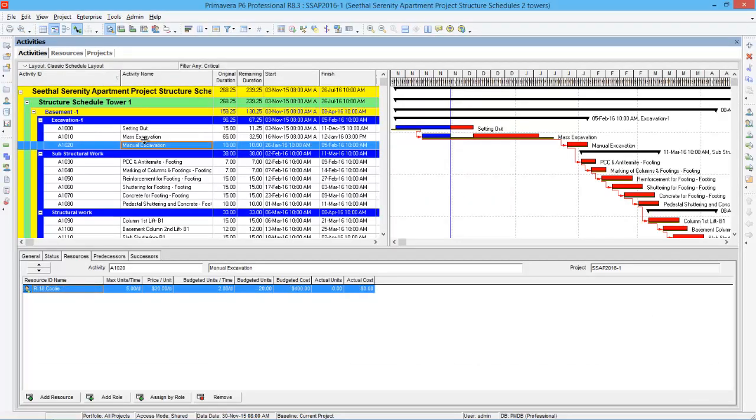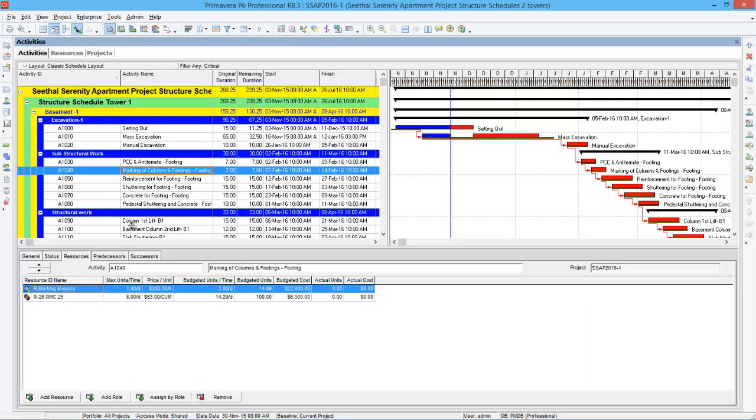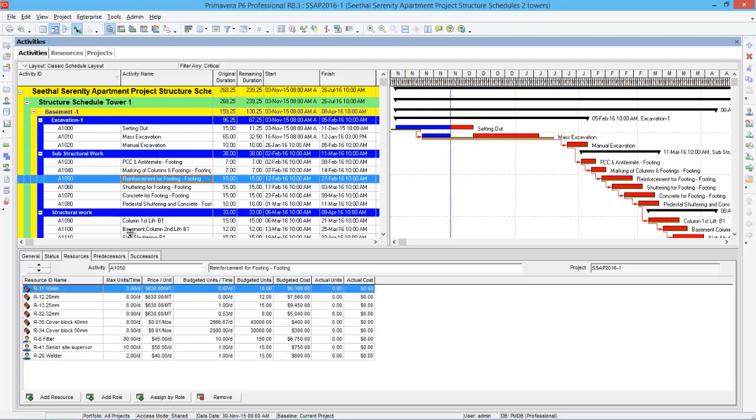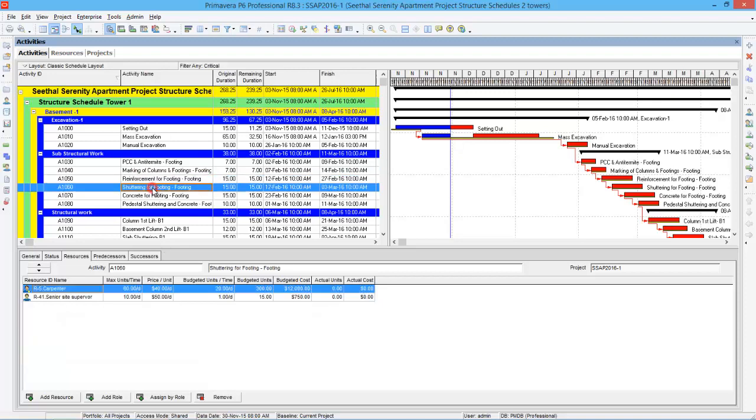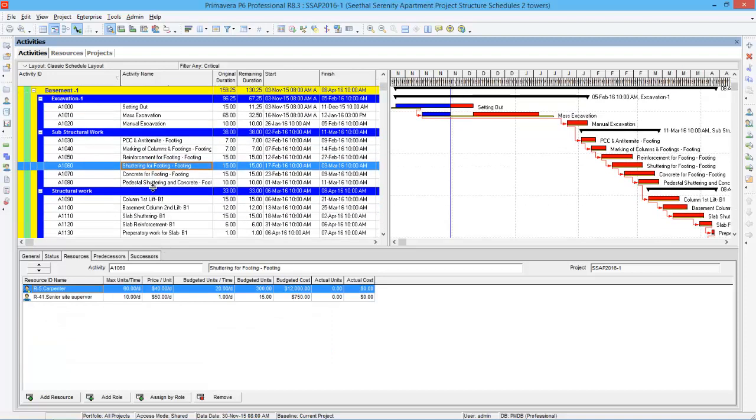You can select the activities and check whether the change has happened or not. So here you can see reinforcement for 14. Previously it was supervisor. Now it changed to senior site supervisor. So this is how global change works in Primavera.